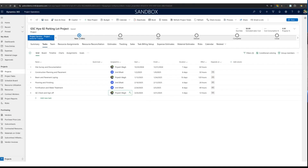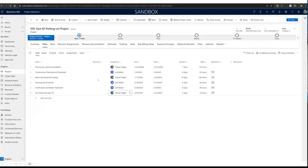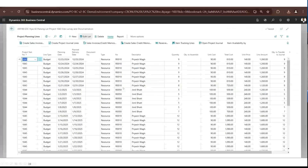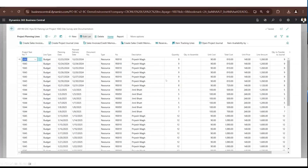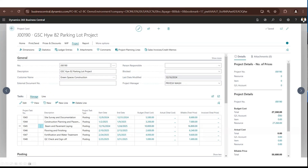I'll populate my project WBS — my tasks are in here — and I'll start to assign resources on the project as well. I just wanted to show this Gantt chart in Project Operations. Since my project tasks and resource assignments are here, they'll go over to Business Central as project planning lines under the project.